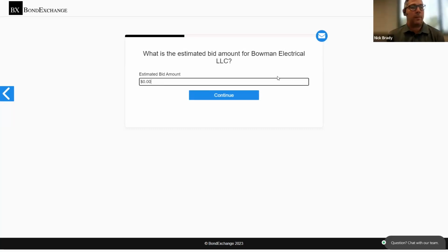Yeah, so it's in the bid packet, the same place they found the information on what work needed to be performed and how they determined what their pricing would be. All the liquidated damages, warranty, et cetera, bid dates, bond requirements, insurance requirements, et cetera, are going to be shown in those documents. If for some reason they're not available to you, you can certainly ask the contractor. They really should know. But yeah, it would be within the bid packet for the project. Perfect. Thank you.